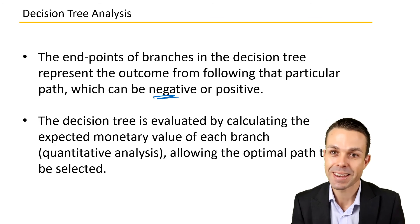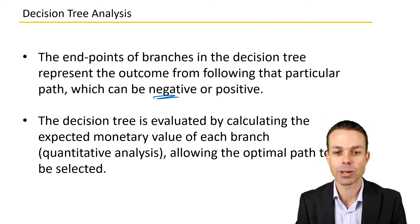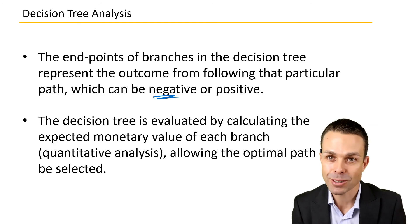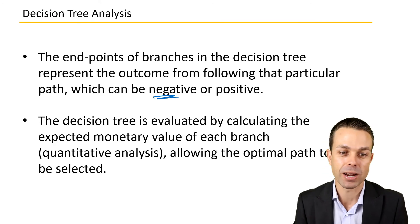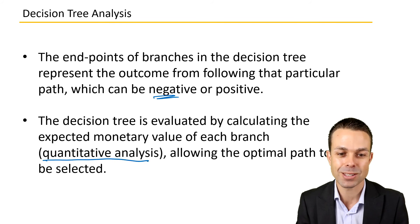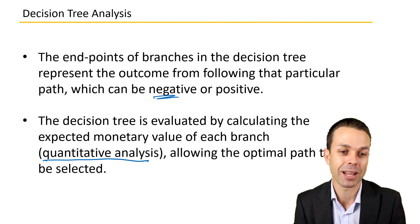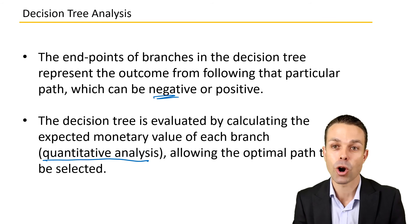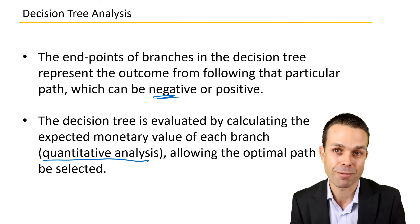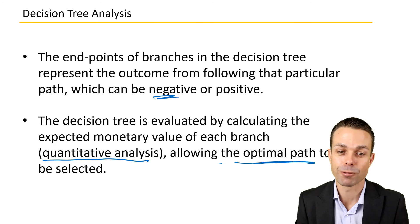The decision tree is evaluated by calculating the expected monetary value of each branch, which is quantitative analysis. That's where our qualitative and quantitative differences come into play — quantitative analysis focuses on the cost or the monetary value, and we want to know what that cost is going to be.